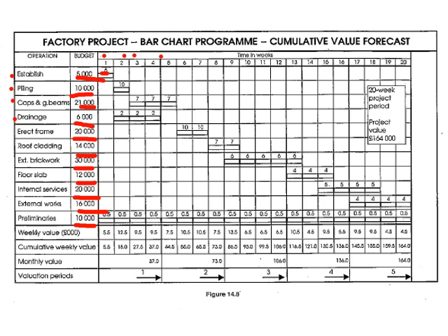So your site establishment will be a week, so in that week your expenditure will be 5. Pardon. And then your piling is also 10,000, and you have a week for that. Caps on your piling will run over 3 weeks, so it's 21 divided by the 3. Your drainage will start early, and it will also run over 3 weeks, and so forth. You can see they made it very simple. They just divided it with the amount of time that you actually spent on it.